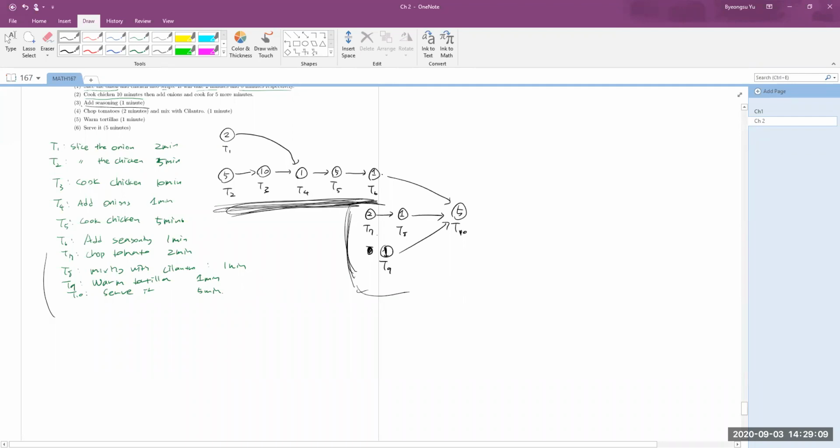To decrease the time of all the tasks at once, you need to decrease your critical path first. Otherwise, even if you have some improvement on other jobs, if it is not on the critical path, it doesn't decrease your job time for completing the task, right? So that's why we are focusing on the critical path. Does it make sense?